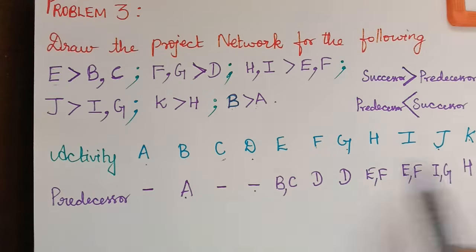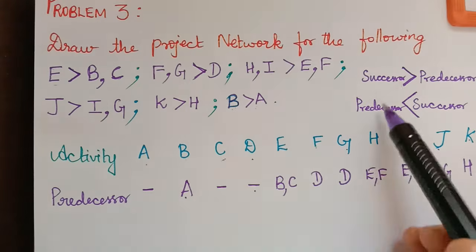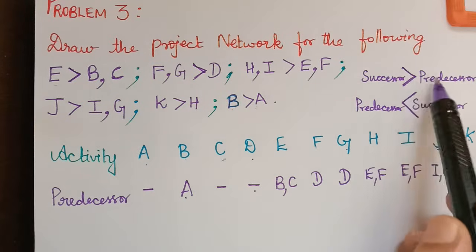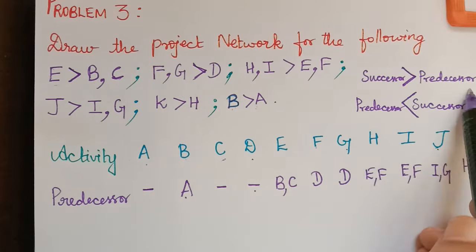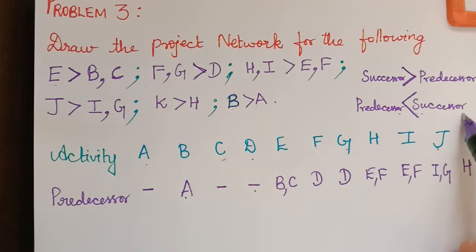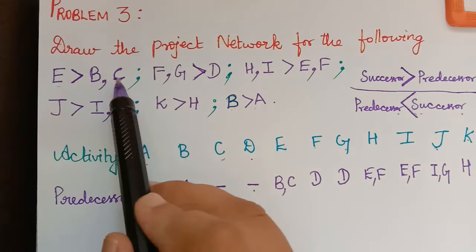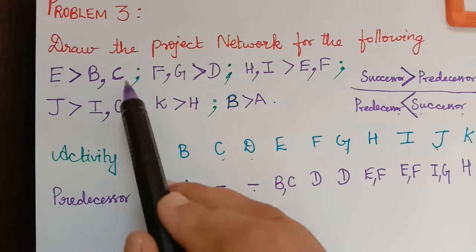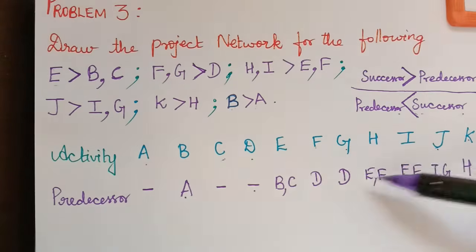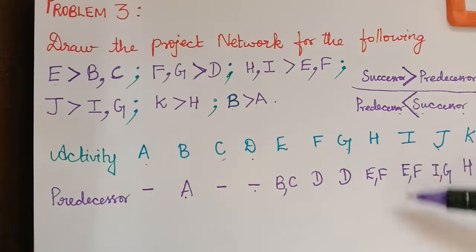We have now written all activities and their predecessors using the given data. Remember: the greater side of the symbol is the successor and the lesser side is the predecessor. Now using this data, let us draw the network diagram.